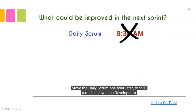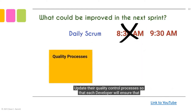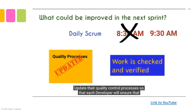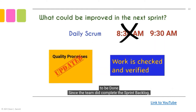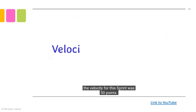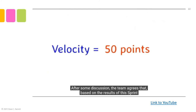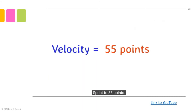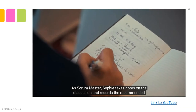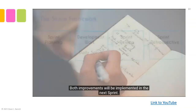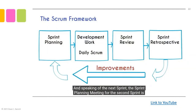Based on the discussion, the team resolved to: move the daily scrum one hour later to 9:30 a.m. to allow each developer to resolve issues from the previous day before the meeting; and update quality control processes so that each developer's work is checked and verified by another developer before it is considered done. Since the team completed the sprint backlog, the velocity for this sprint was 50 points. After discussion, the team agrees to increase the next sprint to 55 points based on this sprint's results and the process improvements identified. Sophie takes notes and records the recommended improvements, which will both be implemented in the next sprint.